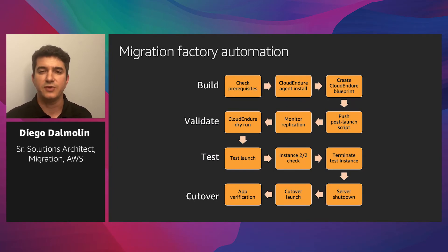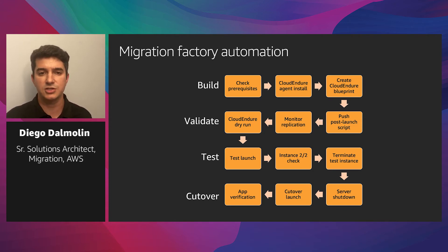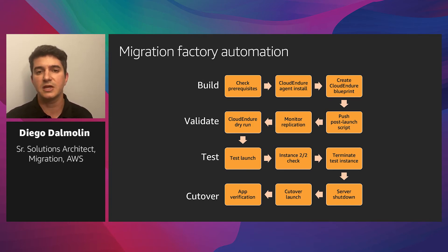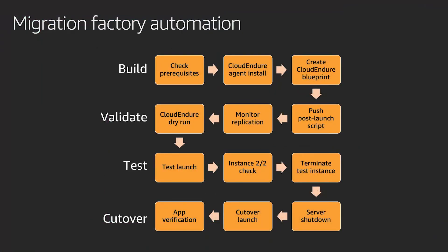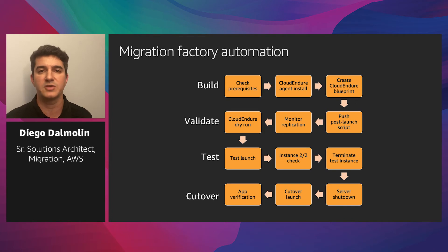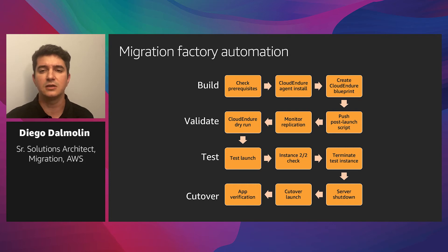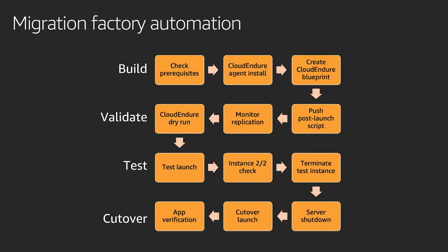A proposed CloudEndure migration factory assembly line would look like this. During the build phase, we start checking the prerequisites on the servers, install CloudEndure agents, and create CloudEndure blueprints. During the validation phase, we push the post-launch scripts to the source servers, start and monitor data replication, and get ready for the dry run. During the test phase, once the data is fully replicated and in sync, we test if the servers can be properly converted to Amazon EC2. Once the test is successful, we terminate the test environment. Finally, when we are ready to migrate, we start the cut-over phase — shut down the source environment, execute the server cut-over, and verify if the migrated applications are working as expected.